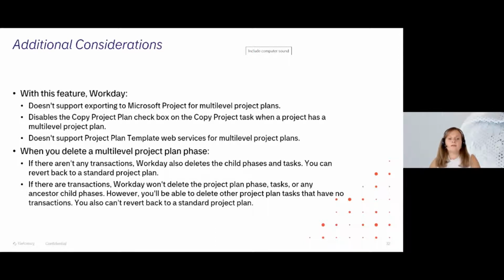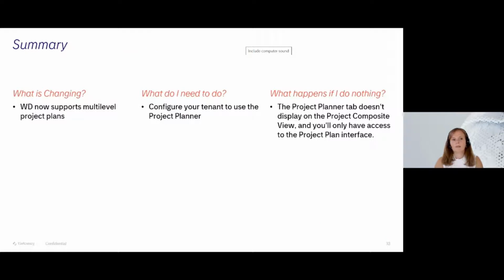If there are already some transactions booked on the project plan phase, you won't be able to delete this phase. However, you'll still be able to delete other project plan tasks and phases that have no transactions booked yet. And also at this point, it will not be possible to revert back to a standard project plan. So, summary about this feature: Workday now supports multi-level project plans, and this feature is automatically available.